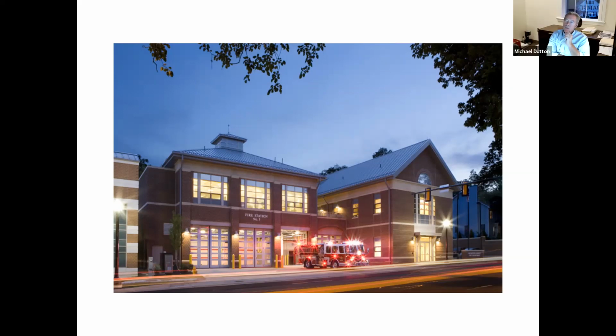The only thing, just from a strategy perspective, the Mitchell School did this because this is how the Mass School Building Authority wants you to do it. We went to the voters and we asked for whatever it was to do the feasibility stage. And that gives you a gauge. If people are going to vote for that, then you can take that as an indication that they're more likely than not going to vote for whatever the final solution is. They don't go and vote $1 million to design without knowing that the building is going to be a 15, 18, $20 million building. So it gives you right up front sort of an indication.